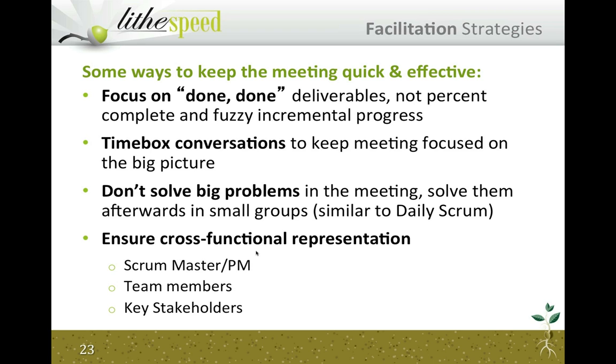You identify that this team needs to go talk to these other two teams, and their respective representatives get together after the rest of the group has finished their core activities. They talk about what they need to talk about, often in little huddles, and finalize things there. So that keeps everyone else from having to sit around in a 2 or 3 hour session as you might otherwise have.